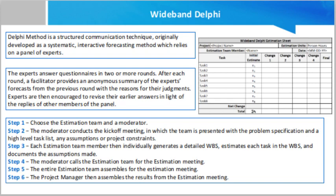In the Wideband Delphi technique, the estimation team comprises the project manager, moderator, experts, and representatives from the development team — constituting a three to seven member team. There are two meetings: the kickoff meeting and the estimation meeting.